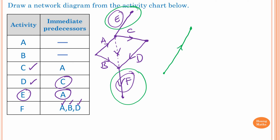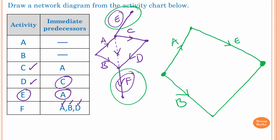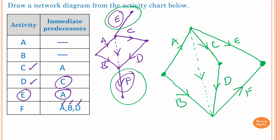So we redraw: Activity A, Activity B, and I place E and F first to make things easier — Activity E and Activity F. Then Activity C from A, and Activity D joining with Activity B. We need to connect Activity A to both B and D, so this is a Dummy Activity. You can see that to do Activity F, we need to complete Activities D, B, and the Dummy from A first. This is the network diagram for this activity chart.